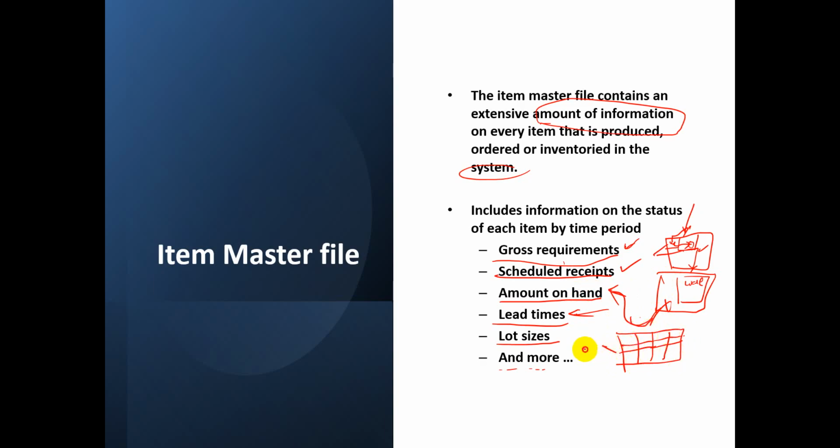Example, 2 1 2 3 4, there is some particular bolt with this number required maybe within 1 month. Then the purchaser will immediately act and procure the materials to receive the material by at least the 25th day, so that it goes to quality check and invoicing, so that by the 30th day the company is ready to use that. So all this lead time is very important in the factory.